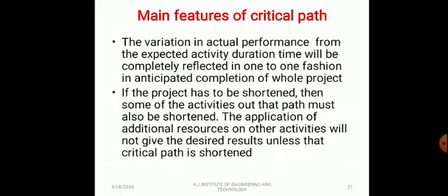If the project has to be shortened, then some of the activities on that path must also be shortened. The application of additional resources on the other activities will not give the desired results unless that critical path is shortened.